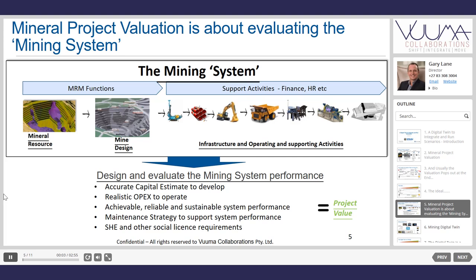That project valuation really needs to look at what I call the mining system, which consists of the mineral resource, the mine design and schedule, and the infrastructure and operating and support activities. Often this side of the mining value chain is not understood in terms of what the system can deliver — it's just averages of drilling, blasting, loading, and hauling throughput without accounting for the interconnected nature of those activities. The system should deliver an accurate capital estimate, a realistic OPEX, and achievable, reliable, sustainable performance on a sustainable basis.